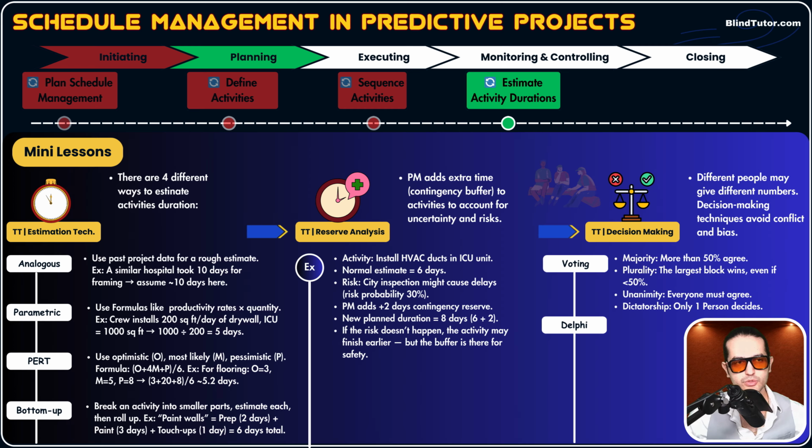Guys, sometimes you want to do this decision making or voting anonymously, okay? Because of the pressure of that meeting, you want to do it anonymously. What technique do you use? Remember the Delphi technique? What's Delphi? Guys, Delphi means experts give estimations anonymously in rounds until consensus is reached, okay? What's the benefit? It reduces bias. So nobody feels pressured by loud voices. Remember loud voices? Hey, my estimation is correct. Yours is wrong. No. Let's vote anonymously and see who's right.